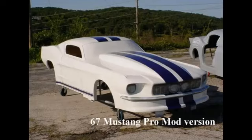This demonstrates budgetary forecasting to maintain performance and safety targets while optimizing resource allocation. Additional factors. Resource cost rates. LJRC meticulously tracks labor costs, for example, $85 an hour per mechanic for engine assembly, $70 an hour for fabrication work, and material costs, for example, $550 per high-performance racing tire, $220 per custom fabricated exhaust system component, to ensure accurate cost estimates for future projects.